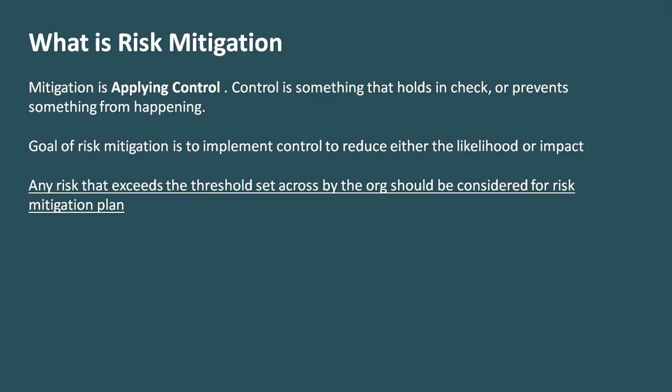That's called applying control. So it is like applying a check or prevention measures to reduce the impact of a particular risk. And most organizations have a threshold unit, right? In logistics, there is a threshold unit. In software development, there is a threshold unit. In software development, you cannot give more than 10 bugs in the second level, or in a customer journey testing.